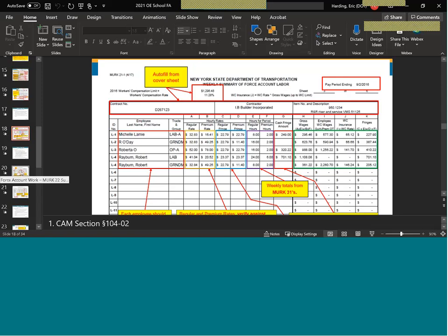Your certified payroll needs to accurately reflect what the contractor is paying the employees. If your wage rate interviews are providing different answers, then that is something that needs to be addressed outside of your force accounts and hopefully well before you get into force account work. First and foremost, the compliance unit should be called in if you have any kinds of those discrepancies, and then they have Department of Labor contacts where things can get ironed out.